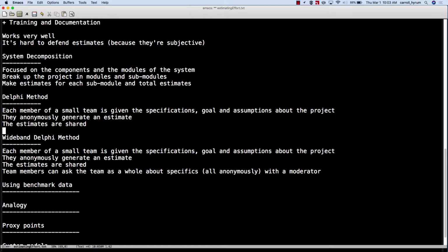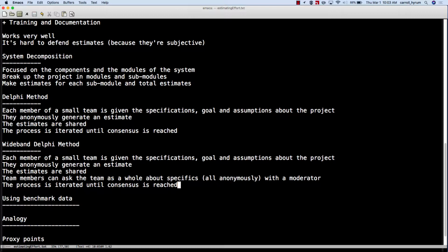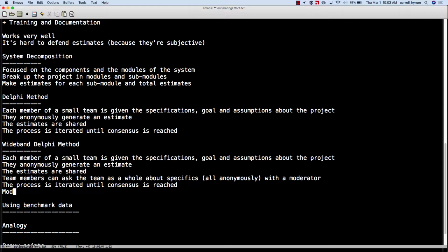So they can have a little discussion of, you know, there's three of us here, there's four of us here, three of us mentioned this, but one of them mentioned that, it seems like an outlier, or what do we think about that? Should we all be increasing our estimates or decreasing them? And to be able to talk about that. And so there's a moderator here. Part of the moderator's job is so that you don't have a minority voice that is squashed by someone that is perceived to be more in authority or something like that. So to give each estimate equal voice so that consensus isn't reached based on seniority, for example, but more based on the virtue of the estimate.